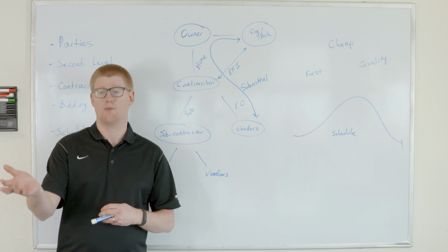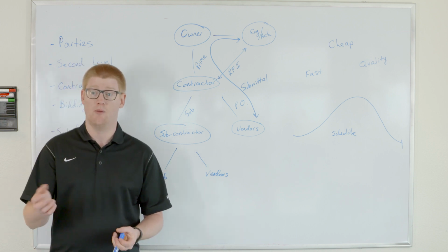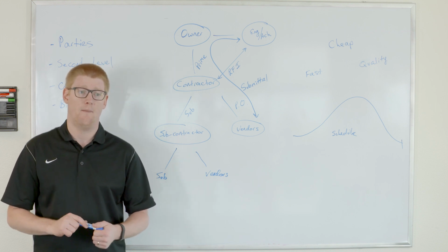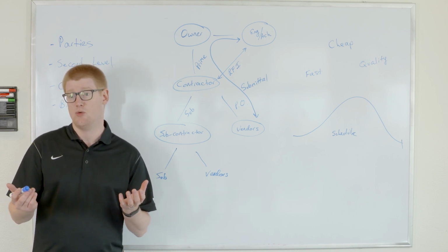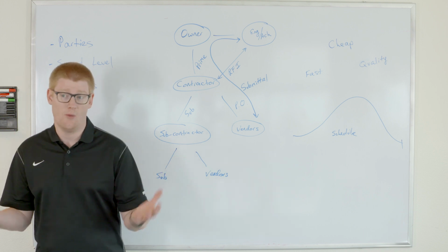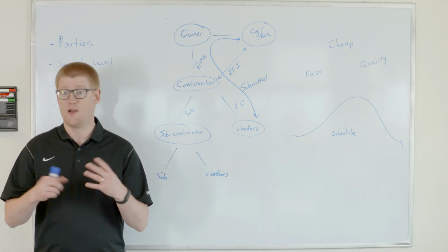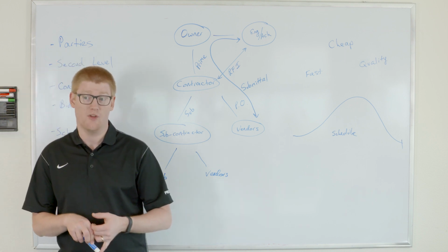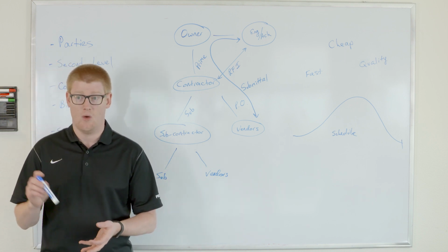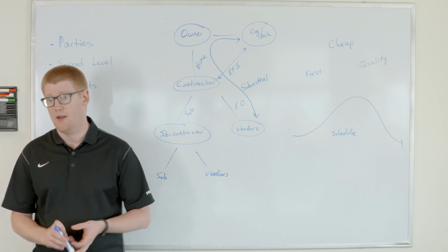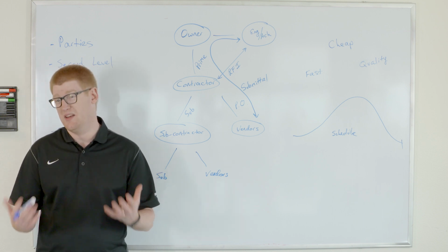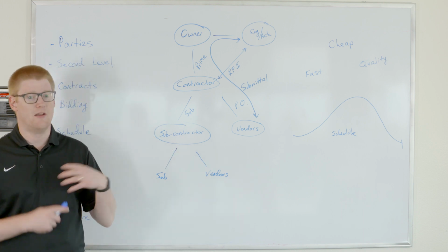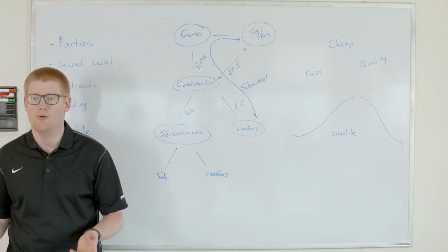So when we gave a subcontractor a set of drawings, for example, we would attach a transmittal that says what the drawings are and what we want them to do with it. And with today's tools like Procore, you no longer need to deal with a lot of those. That's all automatically tracked. When I sent the submittal out, Procore already tracked who the submittal went to, when they got it, why they got it, what we want them to do with it, all at one time. And we can even track when they download the documents. It's very powerful, and it removes a lot of that manual need to make transmittals every time you do anything.